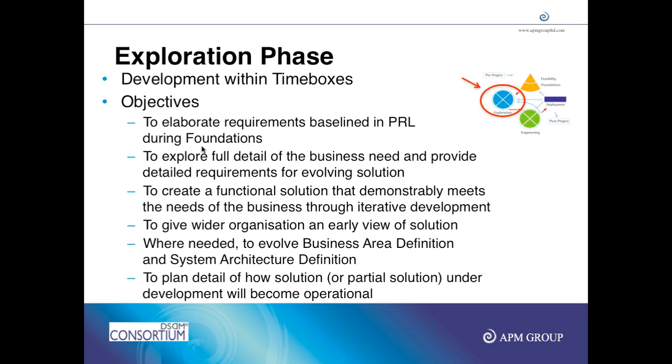Now, exploration and engineering phases are done with the use of time boxes. So you divide your analysis, design, development into time boxes, and then in each time box, you do the work of each of these phases. The exploration phase is actually identifying the project requirements from the prioritized requirements list. So as we step into exploration, in the first time box through all the time boxes, in each time box we do further investigation of requirements. So we pick up user stories that were marked for that time box.